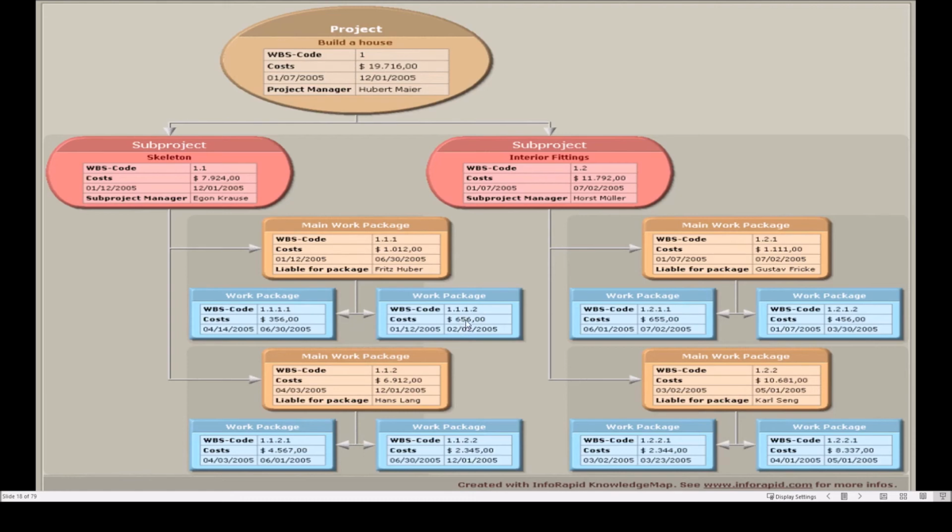That's going to cost us $656. So if they're the two tasks that are going to drive this activity, then we know then that this activity is going to be an accumulation of those costs, and it's going to span that time frame. So we know that this particular work package will commence on the 12th of the 1st because that's the earliest date.